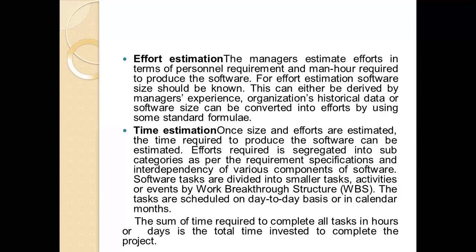For effort estimation, software size should be known. This can either be derived from the manager's experience, the organization's historical data, or software size can be converted into effort by using some standard formulas designed by software engineers. Now, next is time estimation. Once you have estimated the size of the project using this KLOC approach, as I told you, 1,000 lines of code, the effort is estimated.